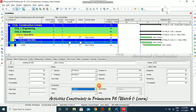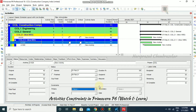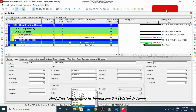First of all, we must know we have four kinds of constraints. First is start constraint, second is finish constraint, third is mandatory constraint, and fourth is late constraint. In start constraint, we have three methods: start on, start on or after, or start on or before.